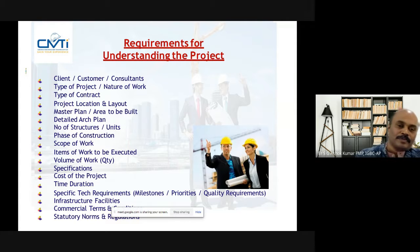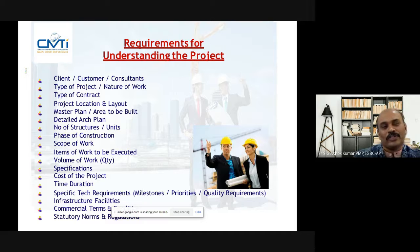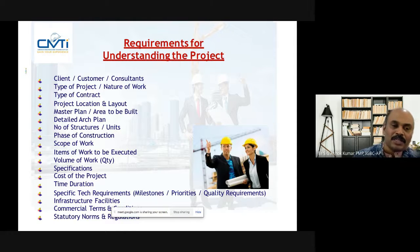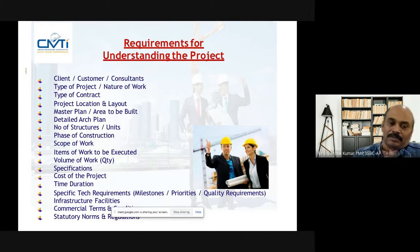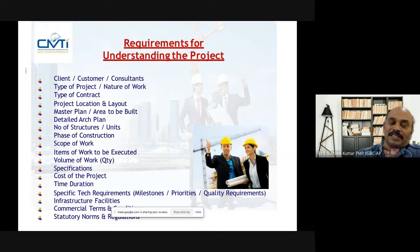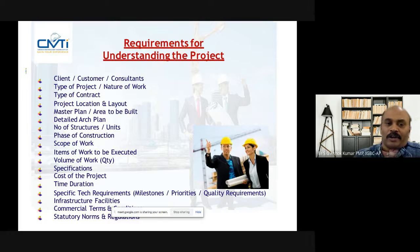While doing the planning itself, you are mentioning the time, duration, and productivity. For that, you should understand the entire project location — where it is, how the logistics work, where the batching plant is, where the RMC is located, locations of other facilities, and workers' accommodation. All these things you should know so that it will be helpful for the planning.